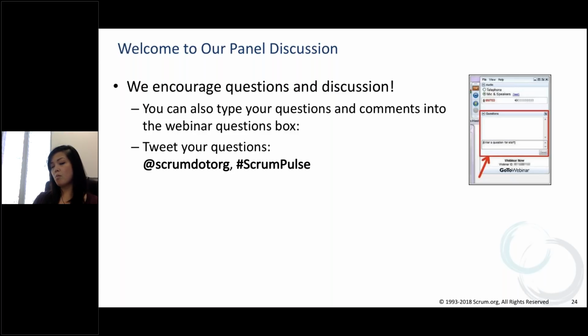Here's a great question about how you subset teams. If a subset of a full team is attending the Nexus Daily Scrum, how do you ensure the right information is getting down to the daily Scrum? I think my question would be, if you need to go to the Nexus Daily Scrum, what's stopping you from going? If it's always the same subset, that could become a smell. I've actually participated in a Nexus Daily Scrum where I saw everybody go, and it was a 5-minute Nexus Daily Scrum. But that would be a question of how you share and raise that level of transparency. And if it's not coming through, then I would suggest next time you go to the Nexus Daily Scrum too. And that's the beauty of it, and that's the difference between that and the Scrum of Scrums, actually.